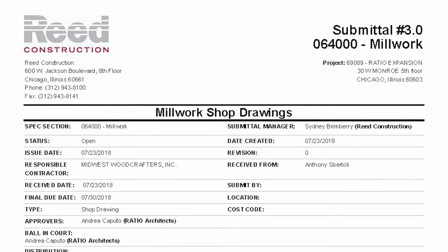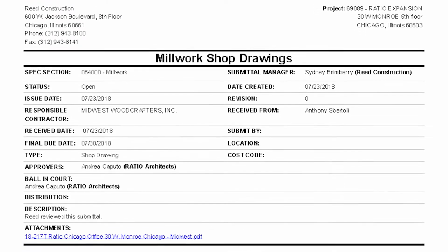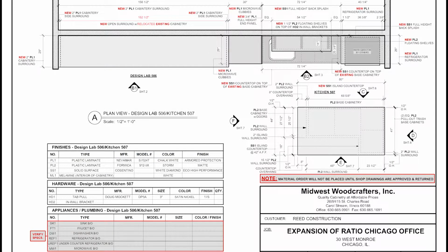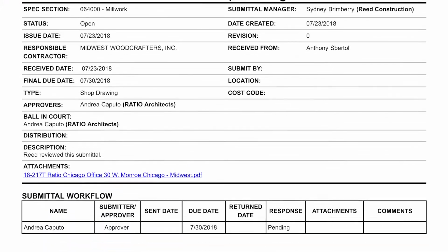The next step is to start reviewing the submittals you have collected. It is your job to do your own due diligence by reviewing and comparing each submittal with the construction documents. If the information is incorrect or missing items, reach out to that sub to have them revise it. If the information appears to be correct, you can electronically stamp and distribute the submittal to the architect or engineer for approval. Once the architect or engineer returns the submittal, you will review the document for approval.